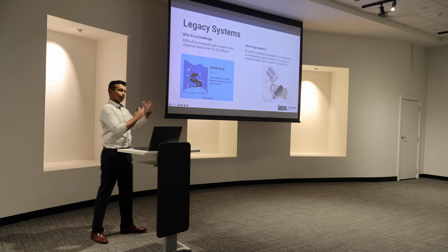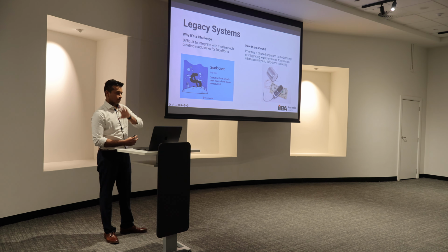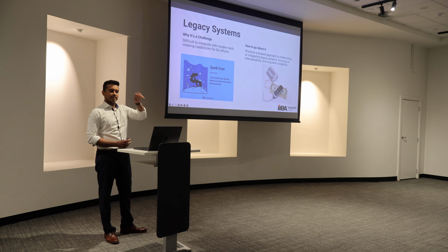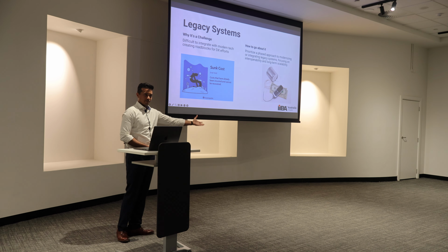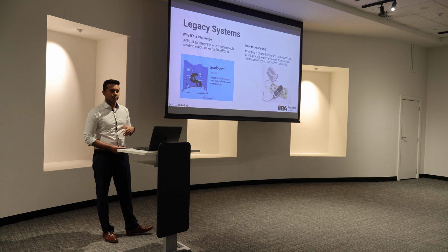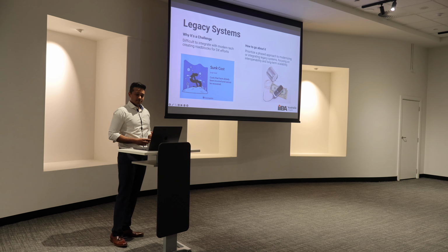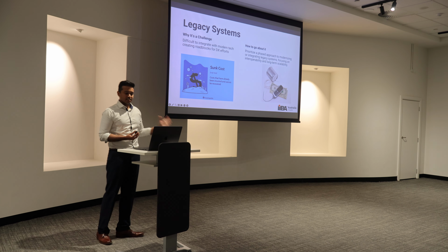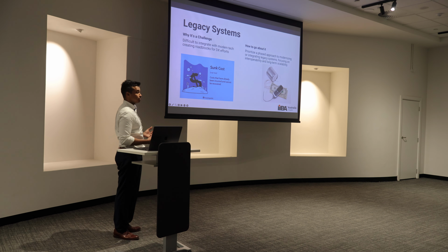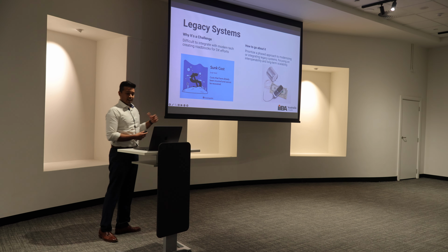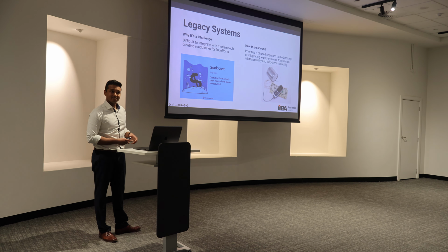We ended up building 12 different integrations instead of 3 to get the people information from their HR system into the payroll system, to get them paid, and to get their pay details into accounting. 12 instead of 3, we could have replaced the software for cheaper. And the lesson, I think, for business leaders is 2 words from my experience: sunk costs. They spend so much money on it, so they want to keep it. And I wish I used this example, and we wouldn't have to build what we had to build in that instance.